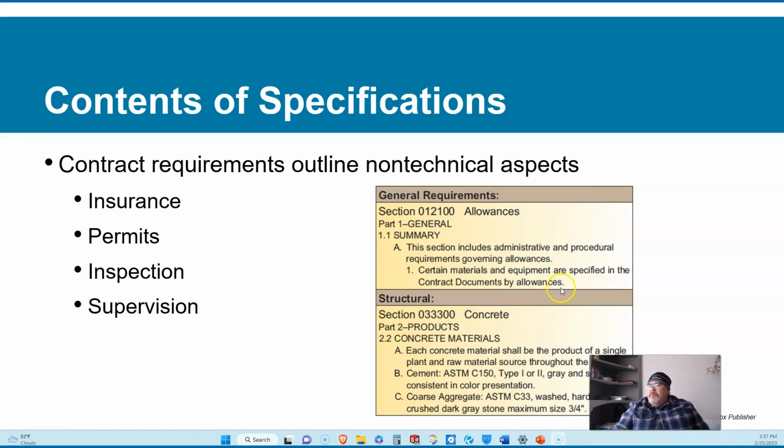For example, you're going to be using tile in a bathroom, but you don't necessarily know the quality or the brand names of certain aspects of the tile. So you will provide an allowance to allow them to select what they want, and there'll be funding that's taken into consideration. An allowance is included in a bid to say that materials will be included in that bid, and an allowance towards that material that's not necessarily specified is provided.